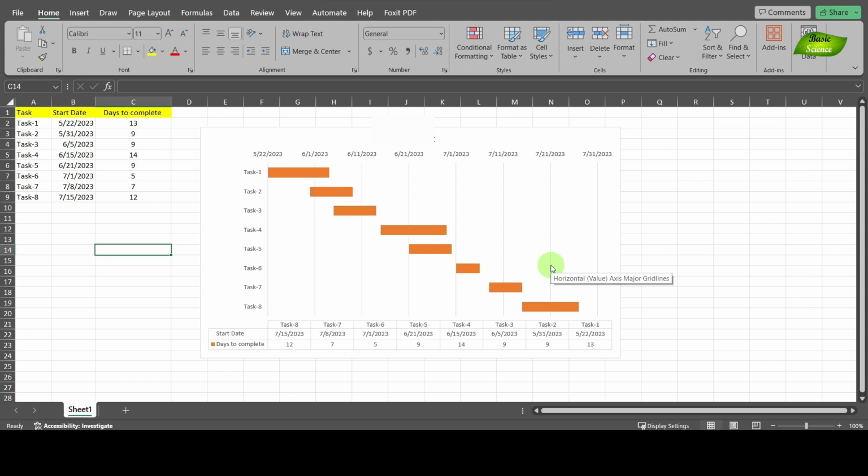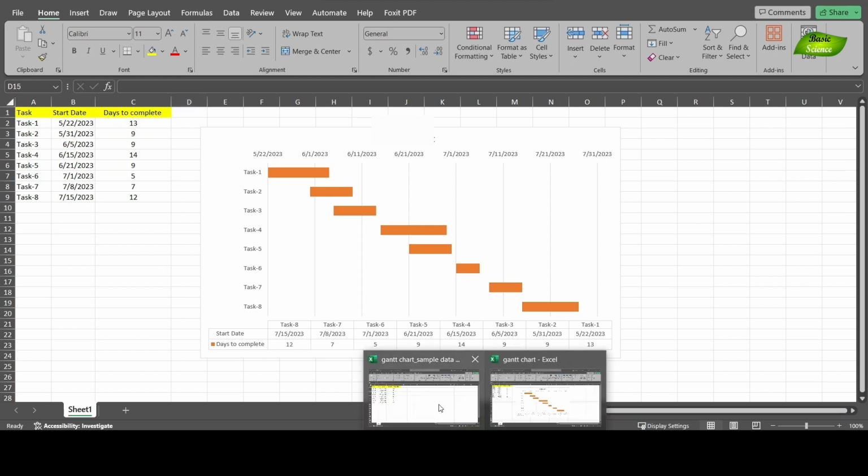If you are working on a particular project, you can define your own Gantt charts, and you can always come back to the progress that you're making. For example, you can create a Gantt chart on tentative timelines, and then another Gantt chart containing the actual timelines, and then you can compare your progress in that particular time frame, right? So it's very, very important. In this video, I'll show you how you can create these plots from very simple sample data like that. So let's move on to another Excel sheet where I have the sample data.